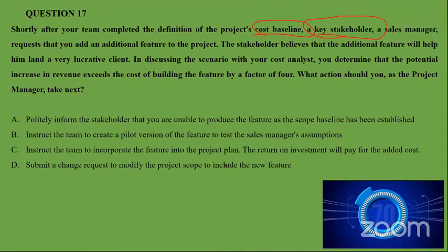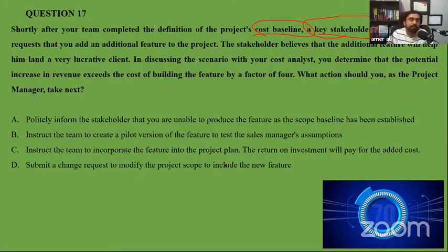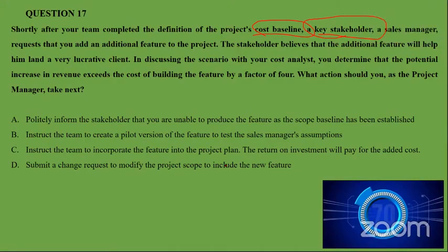Yes, sir. Regarding the same question, I have one doubt. Can the project manager deny or accept things from stakeholders other than through a change request? If they are asking directly, saying without going to the change control board, please add this thing into the scope, they are asking for scope creep. The project manager can deny that. Yes. Okay. Right. Thank you.